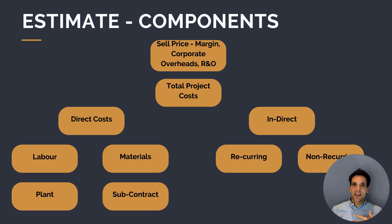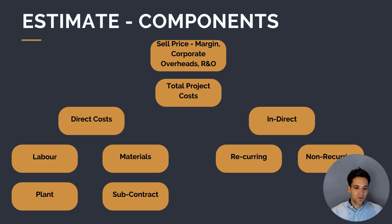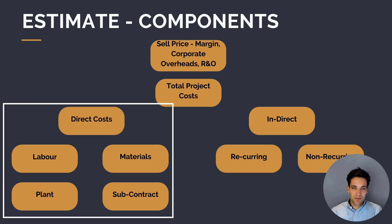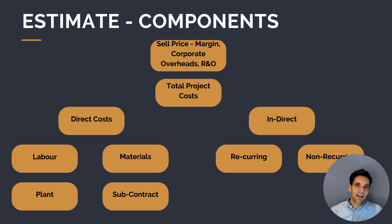Before we can start talking about the estimating process, we first need to understand the components of an estimate. We can break down project costs into two key categories: direct costs — the costs of completing physical construction works — and indirect costs — the costs of managing, supervising, and overseeing the work. Each direct cost item will consist of labor, plant, materials, and subcontract costs.